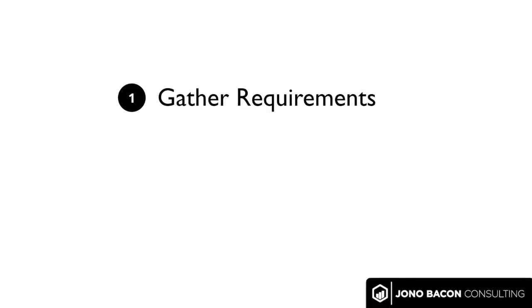So the first thing is we need to gather requirements. This is critically important. Now, what I mean by this is go and talk to your CEO, your CTO, your CIO, like talk to the leadership in the company and sit down with them and say, what do you want to see in a fixed time period? Now, this is really important, okay? Now, the time period that I like is 6 months. It might be a year.